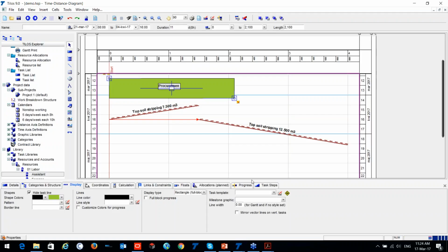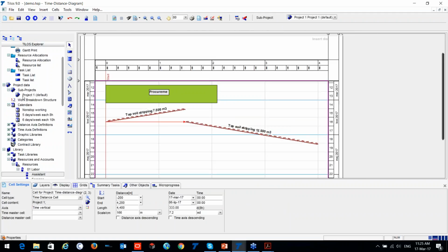But what you can do is, for instance, if you have a project, you can divide it into 2 sub-projects, and later on, the first person can update respective activities on the one, and the second person can update on the different one, and then you will have one master plan, okay, one master plan, and just combine them. Here we have sub projects, so you can combine the two schedules together in order to have it as one project. It is possible.